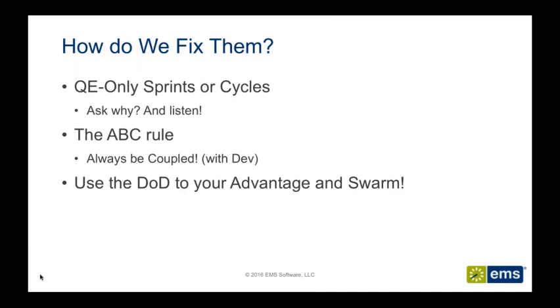If you don't currently have a definition of done or some sort of an agreement that is based off of all of the disciplines that represent your project team, you may want to take that example and make sure that the definition of done is agreed that a story is not only dev'd but completely tested and eventually shippable at the end of the sprint. So simply by retuning what the end of the sprint means and saying it needs to be shipped, which means that it should be able to be consumed by our users, that has worked miracles, honestly, with just the deliverables at the end of the sprint. And we've seen a significant decrease of rollover work that tended to happen without having those deliberate and thoughtful conversations.